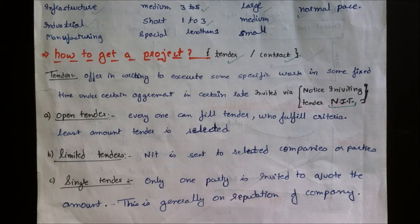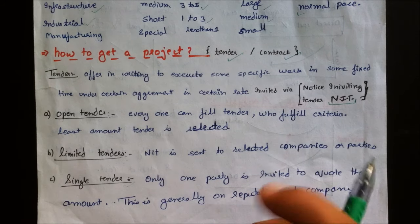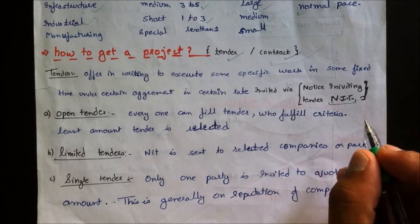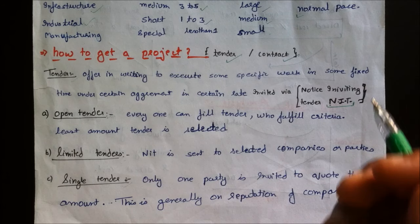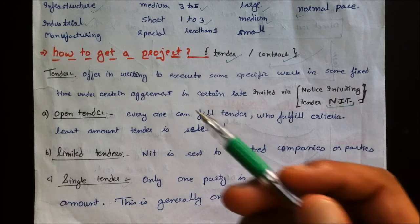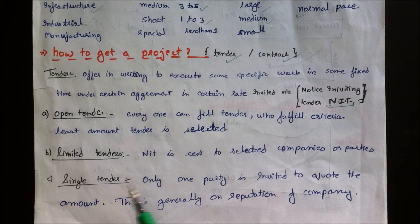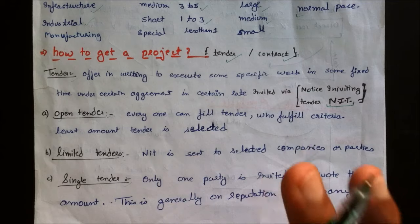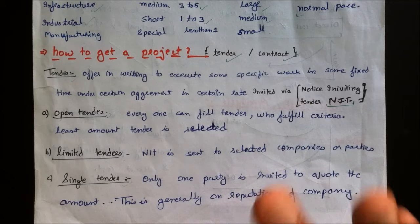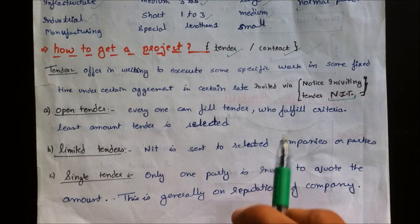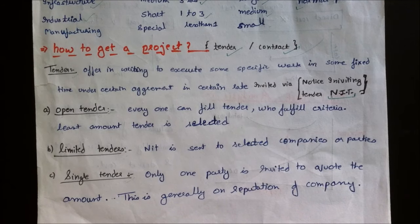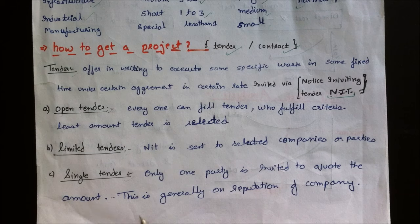A project is generally acquired via tender or contract under an executive engineer. A tender is an offer in writing to execute some specific work in a fixed time under a certain agreement and at a certain rate. There are three types: open tender, limited tender, and single tender.